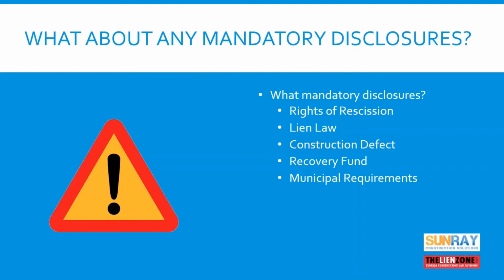Finally, there are certain municipalities that require disclosures for residential construction. Miami-Dade County is one. It requires roughly a page of disclosures for any residential construction. So the takeaway is, if you fall into the category, and again, it's typically residential construction, that requires these disclosures, you have approximately 2 to 2.5 pages of disclosures that are required by the law, the failure of which may render your ability to enforce your contract or lien the property in jeopardy.